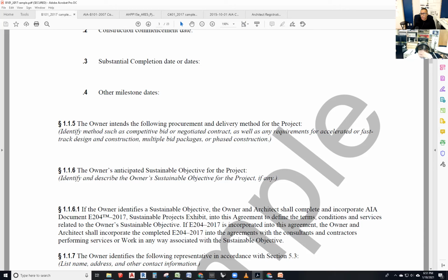So if we're doing a design bid build, which is a traditional delivery method, it's a different set of parameters, a different set of rules. Why? Design bid build, like the name describes it, DBB. So you design it, right? Then you send out the drawings to bid. So your design process is pretty much controlled by you and by the deadline that you have created with the client.